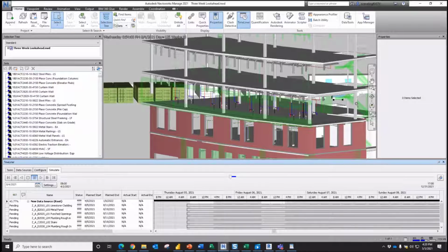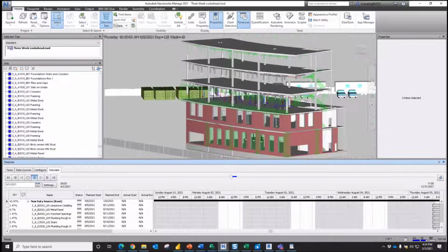If we were in a construction coordination meeting, we could see that we have exterior skin going on, we've got ductwork on the floor above, we have piping, there's stairs. We're beginning to have safety considerations for fall protection that must really be addressed. These stairs are going to require safety hand railings and whatnot. These conversations can start happening prompted by this type of visualization with a 3-week look-ahead schedule.